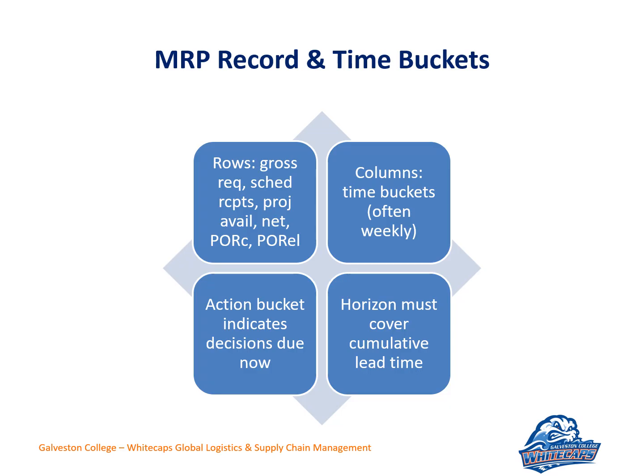It includes everything, all the levels, everything that has to come in, and if anything's pushing back or causing delays, that is your horizon, right? One example is a washer motor that shows it's in week 4. That's when it's planned to receipt, but the release is in week 2. So you've got a 2 week gap right there, right?